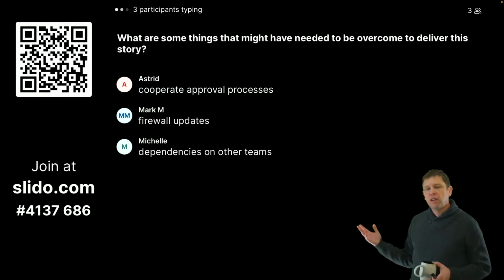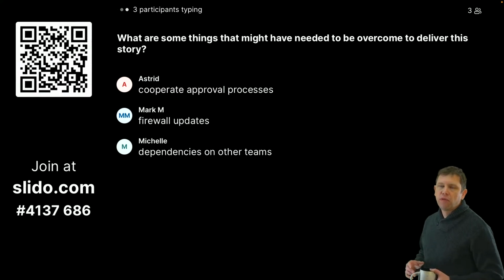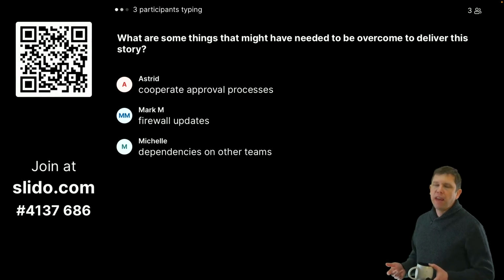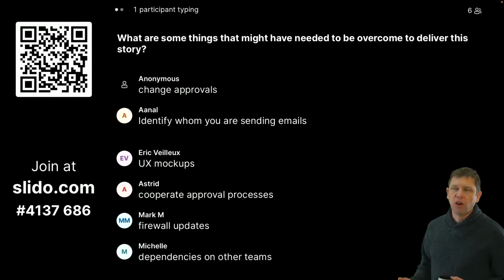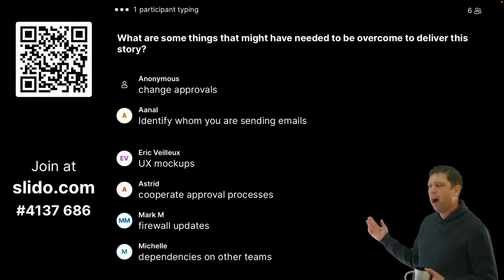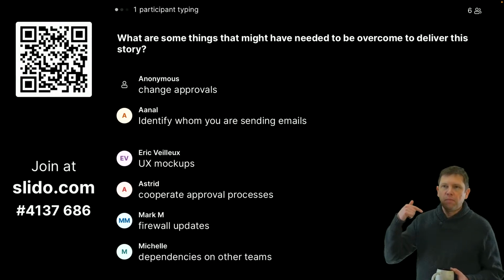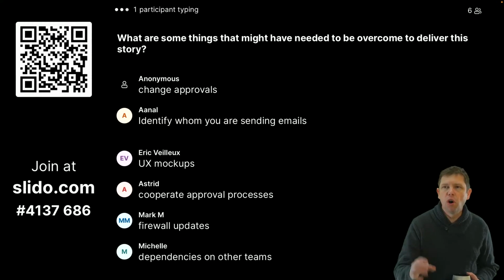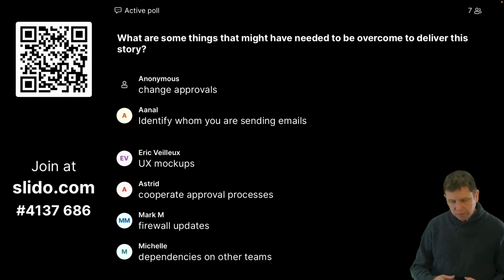So all of these things that we're mentioning here, we've got a very small story, actually writing the code for that may have been 15 minutes worth of code. Now, finding the credentials and stuff like that may have taken as long as writing the code, or maybe it took 30 minutes, or maybe it took 2 hours or something like that. But it's really easy for us to start getting into the mindset of, oh no, that's too small. I'm not going to deal with something that's small. I need something bigger to make it worthwhile.